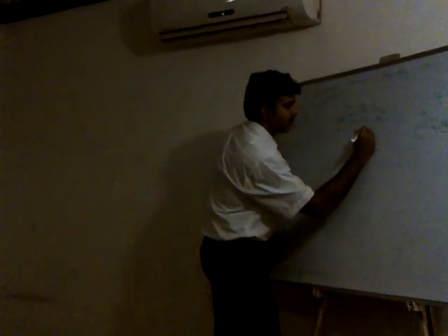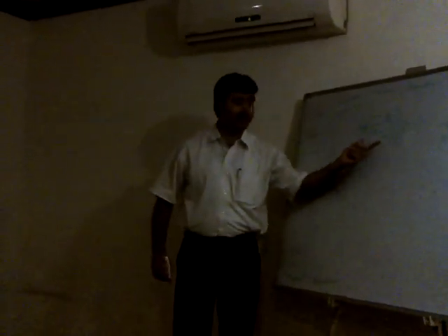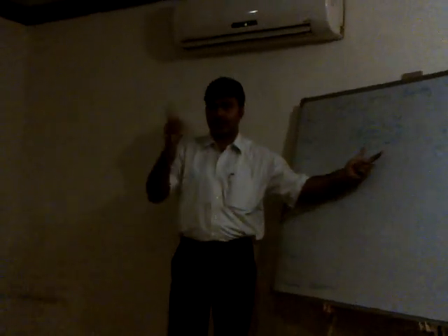Create WBS. And you come out with your scope baseline. Clear? Yes. The tool and technique which you use here was called decomposition. What was decomposition? Breaking down. You broke down the high level deliverable into more manageable work components, lower level deliverables. Okay. Now in the WBS we had seen work packages, we had seen planning packages.